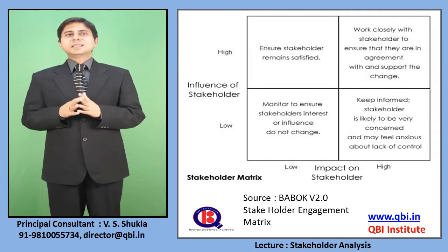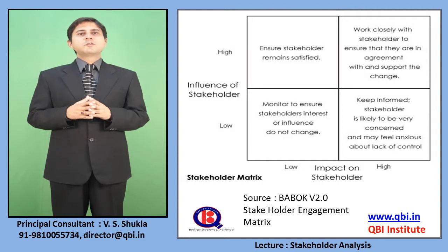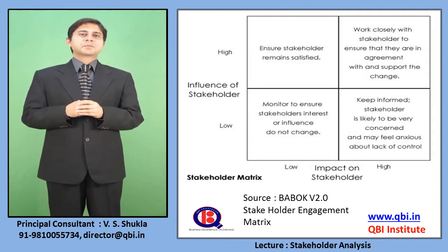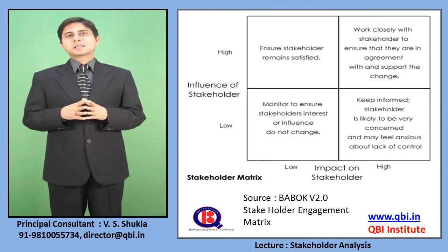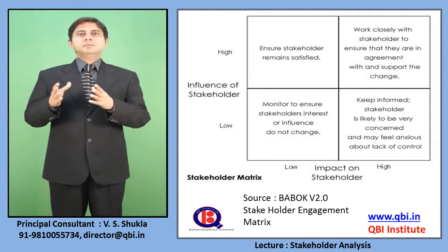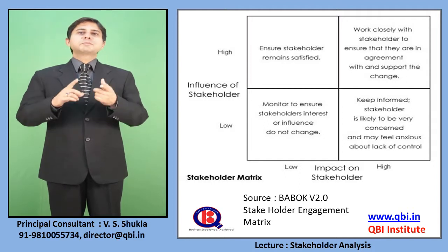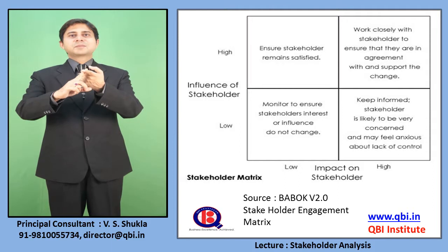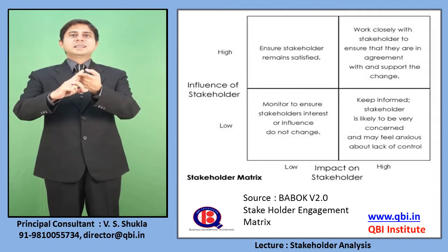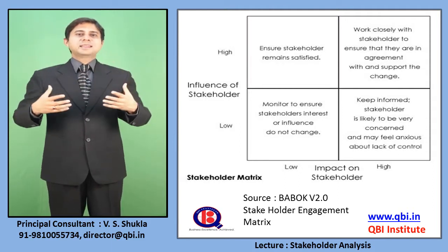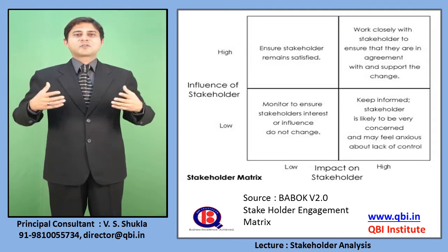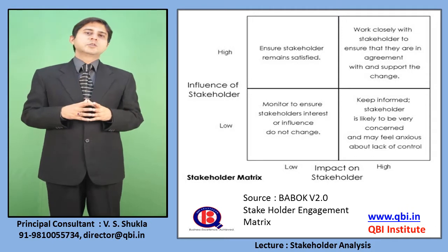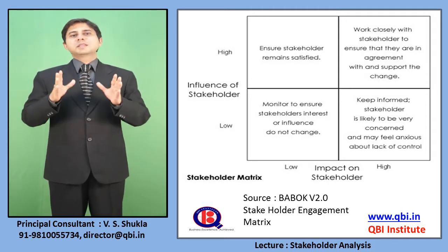And then there can be a set of stakeholders who have low influence but a high impact on them. Say, for example, data entry operators or end users in the marketing department. You keep them informed so that they have a low level of anxiety for the change. They can be concerned because they see some changes happening and feel that they lack control. So your duty as a business analyst is to keep them informed.